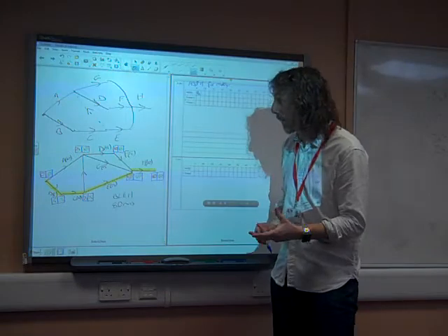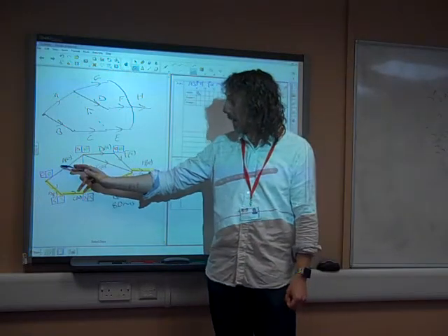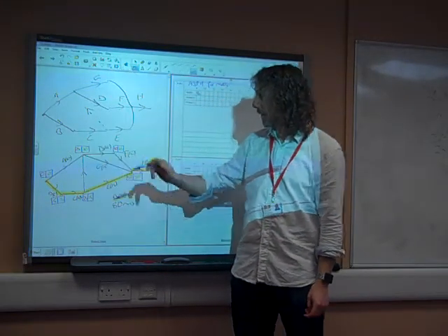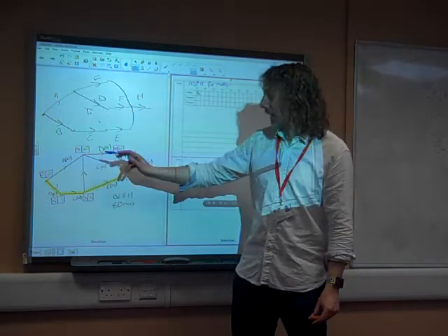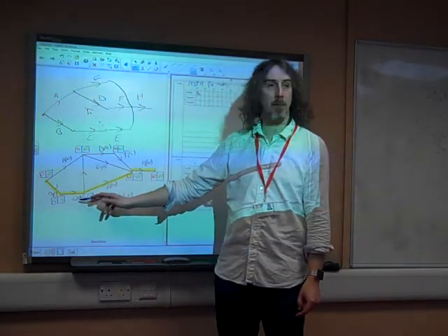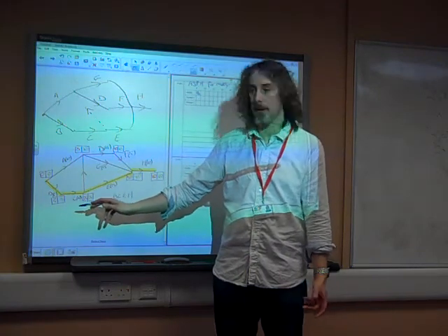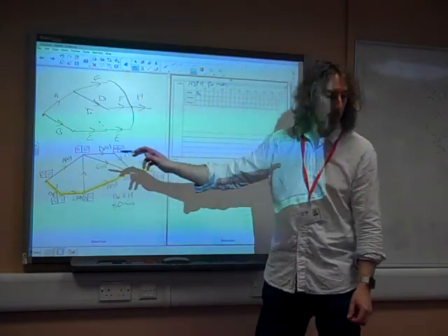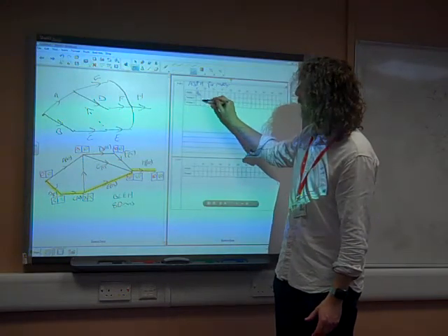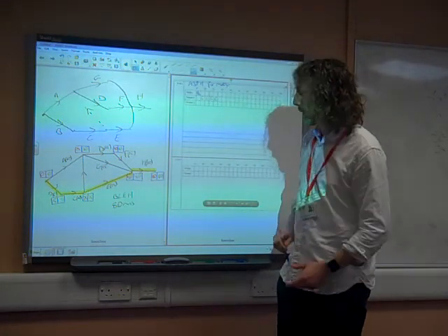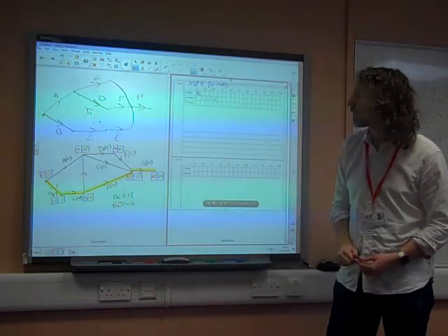She also has to do A. Now A has to be done by 30. If she's doing A, then C must be done by somebody else, mustn't it? Because C has to happen immediately that B is finished. So let's put C straight in with person 2. C is 20 minutes, so that's there.